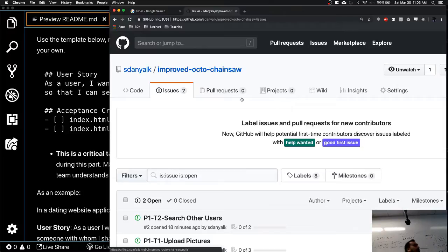Now, again, 2 weeks is not a hard set date. It depends on the company, it depends on the team. Some people have 4 weeks also. That also works. You want to keep it short. Now, our whole project is 2 weeks, right? Can we have a 2 week sprint? No, we cannot have a 2 week sprint. That would be going back to waterfall and delivering the whole project.